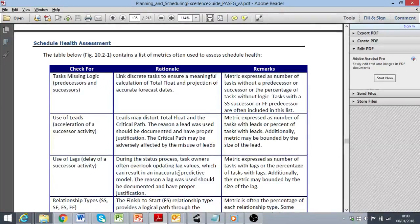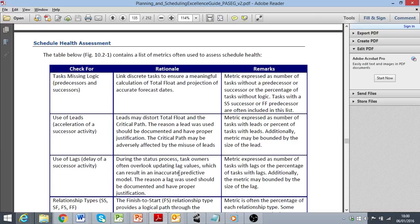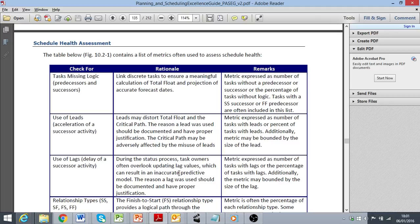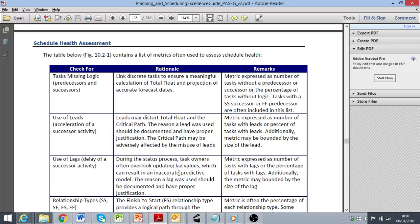We will now take a similar approach to identify dependencies within the activity network which make use of leads and lags and also collect metrics with respect to the percentage of activities within the project that have these dependency types assigned. Of course there's nothing wrong per se with the use of leads and lags, but we need to be able to identify and review where they're used to ensure that they are fit for purpose.